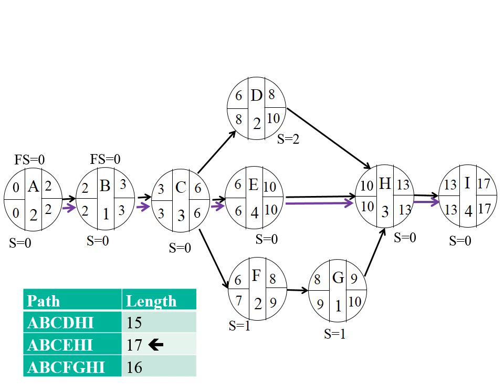Let's look at D. What is the earliest you can begin? 6. What is the latest you can begin and still complete the project? 8. You have slack of 2. Any of that is free slack? Well, think about this. If we start activity D at 7, what is the earliest you can complete the task? 9.